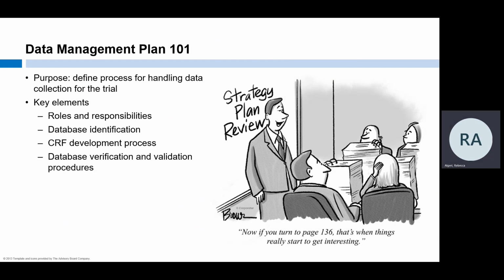How will case report forms, or CRFs, be developed? In my experience, these are generally drafted by the data manager in collaboration with the PI. The final draft is approved by the PI, and the data manager builds the CRFs into the database. We will test the database to make sure that the CRFs are designed to collect the data accurately and that the database functions as intended. Those processes are verification and validation, respectively.